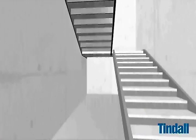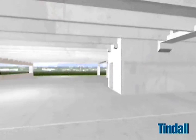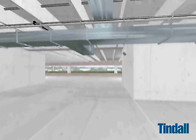No, it takes, we had one member do an 8-story building and they did 80 days of erection time on it. So basically it was a story a week that went up on it. It was pretty fast. Here's the HVAC hanging right off of it.